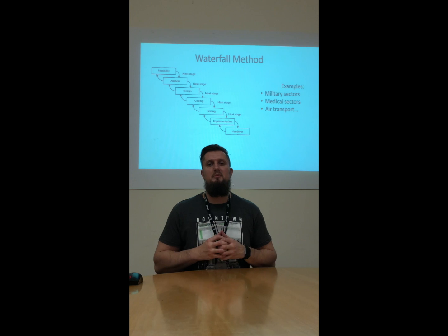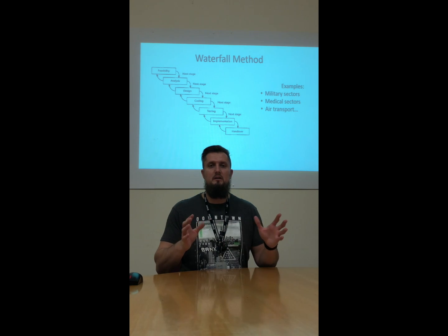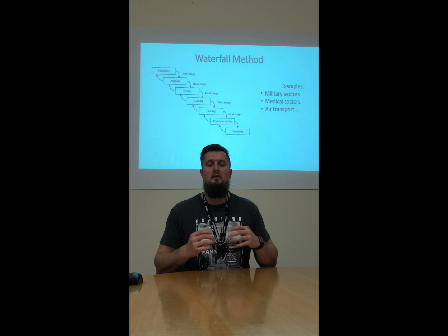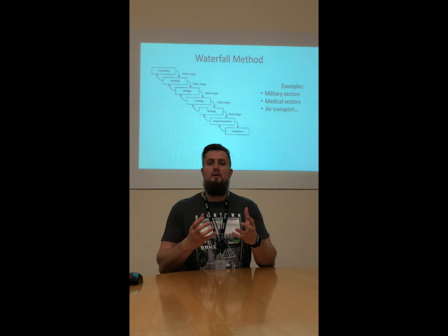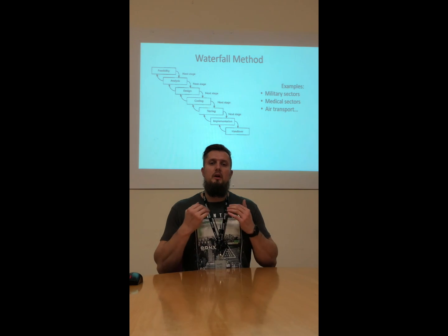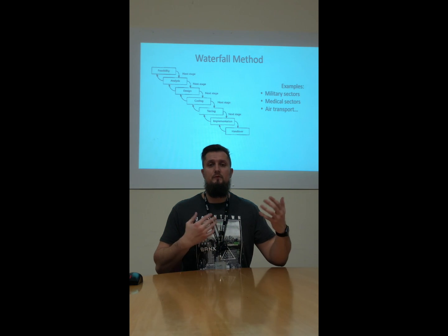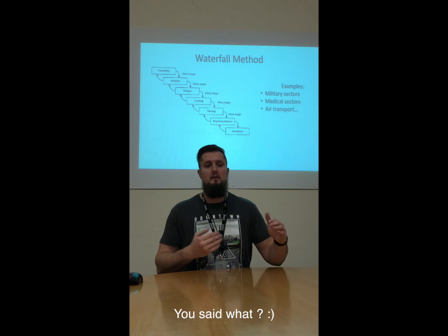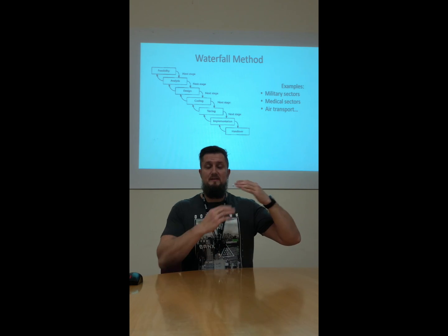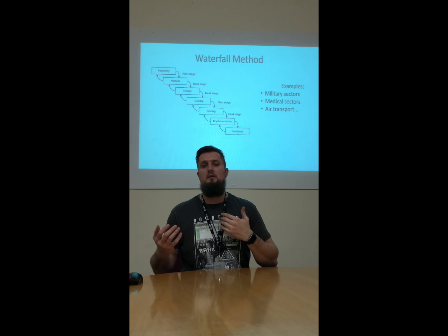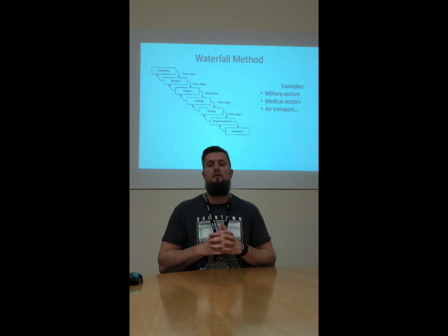Design is where the technical bit starts. You have to draw and design the actual software, the completed software, as you imagine it and as you think it will function at the very end. When you do the coding, which is the next phase, you cannot start coding without the fully submitted, fully verified design. And as I said, one step's output is another step's input. And that's exactly what I mean. You can't start coding without having a fully implemented design.